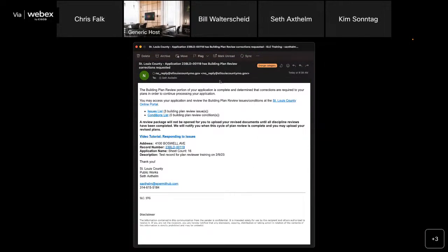So this is going to let you know in the subject line which review, right? So this says building plan review. I might have a mechanical, electrical, plumbing, a zoning, a site, a civil, floodplain, etc. So there might be many different types of reviews that are conducted as a part of your project. And once they've completed their review for this initial cycle, you'll get this notification letting you know that they have published some comments that you can go ahead and review. So in this case, we have 3 comments that are available for review.